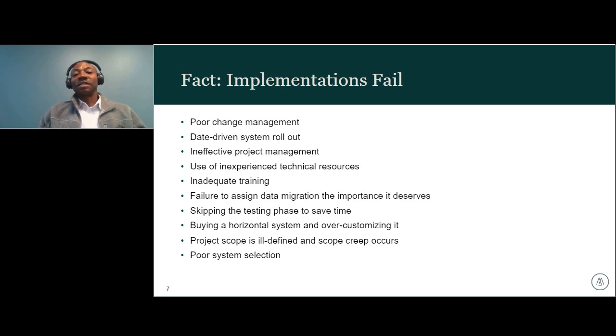Another reason is skipping the testing phase to save time when companies go live on projects. With little testing and rushing to meet project deadlines, you end up with a lot of issues and then start resolving problems in the middle of processing live transactions. And soon enough, everyone is overwhelmed and stuck in an endless loop of issue resolution.